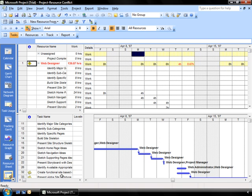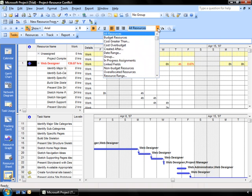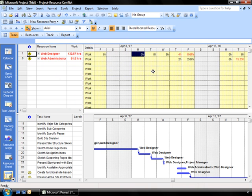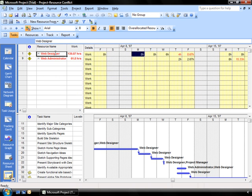I want to just pare this down somewhat just to look at the over-allocated resources. I can do that by going up to my filtering options and selecting over-allocated resources. And it now simplifies my view so that I can see which resources are over-allocated. And then the different tasks for the resource that I have selected above. So if I'm looking at my web designer, here are the tasks that person performs. And I can now start to adjust my allocations for that individual in order to level out their workflow.